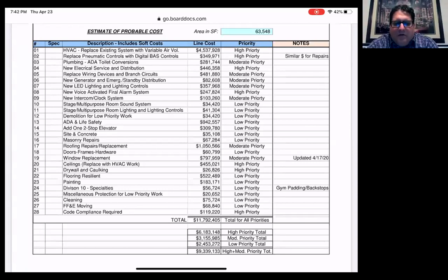was these are a series of maintenance projects. Because we're not doing renovations and we're not changing walls around, et cetera, we try to keep ourselves to the maintenance side of things, where we can do ADA work, but we try not to push ourselves into the place where if you do so much work, you're going to have to do at least 20% that is improvement of ADA. So there is a way to modulate that and control it. The simplest way for me to explain it is when you do a series of maintenance projects, as opposed to something more akin to a renovation, you keep yourself from being pushed further into having to make everything ADA compliant, as opposed to doing a few things to help ADA compliance along in the building.